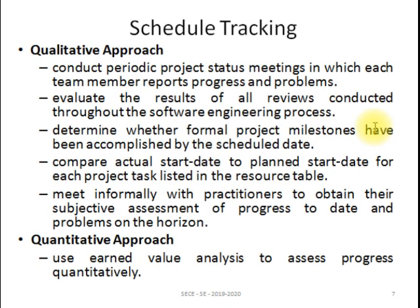How do we track the schedule? We already implement our schedule and based on that we are developing the project. While developing, we have to assess whether the schedule has been properly implemented. For that we have two approaches: qualitative and quantitative. In the qualitative approach, we conduct periodic project status meetings where resource persons and developers convey the status of the project.